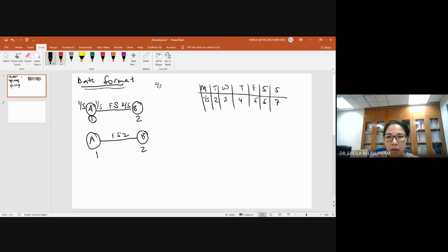In calendar form it is very easy. You imagine the start is 1st May. One working day, you finish here, landing at the finish of the 1st. The front is the start of the 1st, and the finish line shows the finish of the 1st. So one working day shows the finish of the 1st. Then you start on the 2nd here. Two working days, 1 day, 2 days. You want to find the finish, so it shows the finish of the 3rd.